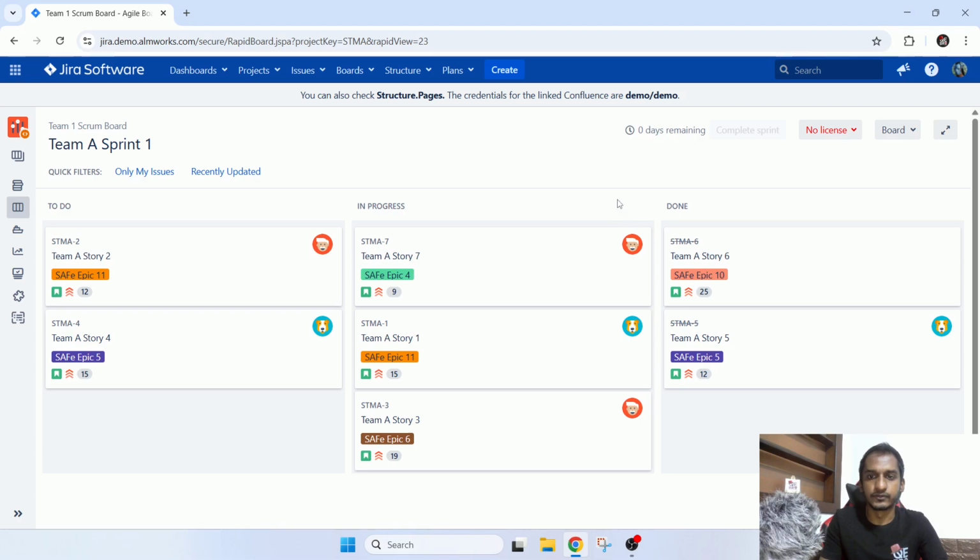There you can select different options, whether to move the ticket to the backlog. Let's say the ticket has deviated or the plan changed, and we will not cater to it in the near future, then you can move it to the backlog. Or else you can move it to the next sprint, sprint 2. Those options will be there, and then you can mark it as complete. And then the sprint will finish. This particular ticket will be moved to sprint 2, so then you can carry out the remaining work in the next sprint. Okay, so that is about that.